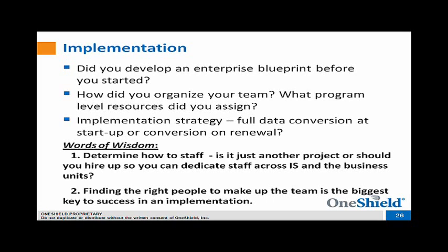So you've got to make sure you're pulling things out in a controlled fashion and implementing it properly. Besides the blueprint, you want to make sure about the implementation strategy: how you're implementing it, and in what order. Is it causing you the least amount of what we call coexistence issues, so that you're not dealing with two different systems? And is it providing enough business value at the same time?